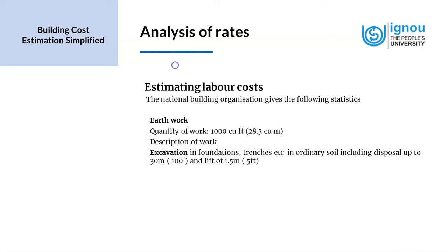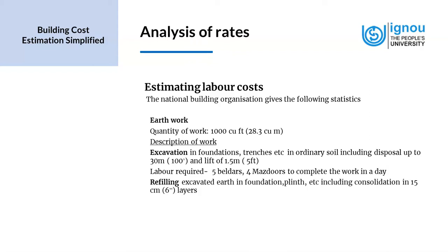The description of the work. First is excavation in foundation, trenches, etc. in ordinary soil, including disposal up to 30 meters, which is 100 feet, and lift of 1.5 meters, which is 5 feet. And for this, we identify the labor required: 5 beldars, 4 mazdoors, to complete the work in a day. Now, refilling excavated earth in foundation, plinth, etc., including consolidation in 15 centimeter layers.